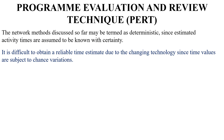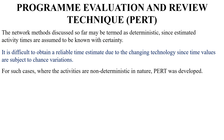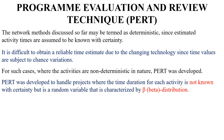It is difficult to obtain a reliable time estimate due to changing technology, since time values are subject to chance variations. Most of the time, the time duration for an activity is not a fixed duration — it will change. For such cases where activities are non-deterministic in nature, PERT was developed.